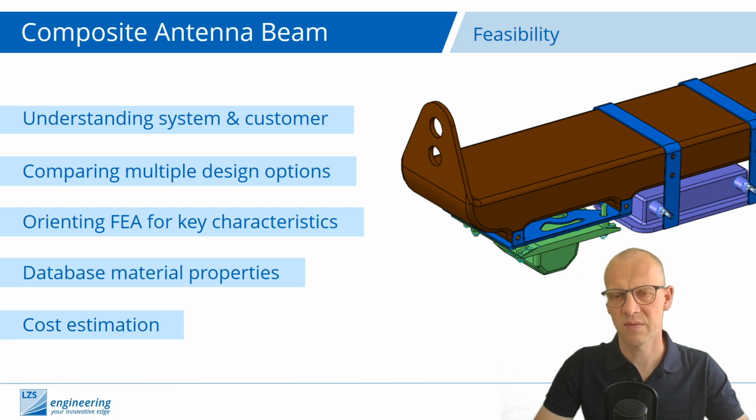And of course, if you have done a good first glimpse of simulation, you have available a good educated guess of the amount of material you need, and with the information from the manufacturing department, you will have all in hand which you need for a good cost estimation. And a cost estimation is the final part of each feasibility study, because we all know that in the end the costs will decide whether a project is running further on or not.